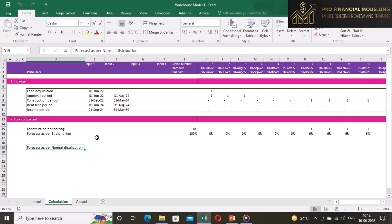Now we are starting the forecast as per normal distribution curve or S-curve. In this approach we assume that construction cost will follow the normal distribution path which is similar to bell shape curve.